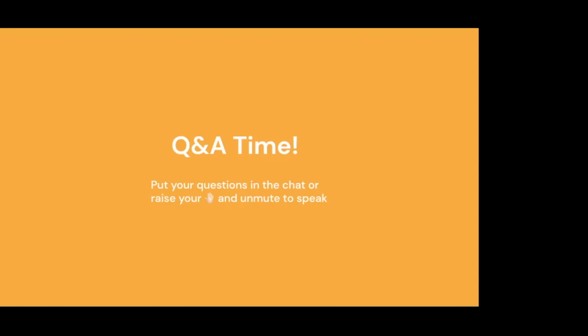What is the goal? What are you trying to build? Is it a website? And what are the requirements? And then based off that, you might want to say, okay, I want to spend 2 hours on research. And then you want to work with your team. If you're in a team, then you want to brainstorm with your team for 2 hours. And so think about setting that milestone.